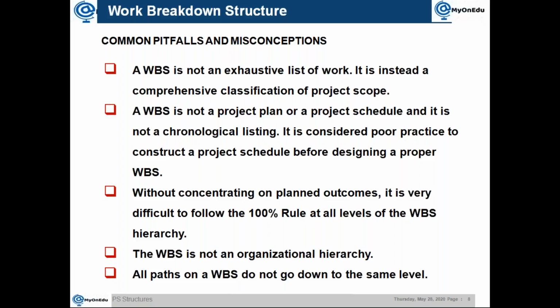So always and always, even if you go for PMI standards or almost all the implementation methodologies, they say give the ownership to the executing party. Whoever is going to execute the project has to take the ownership of the project, or you can say the plan, or you can say the structure. So whenever you are considering the WBS structuring, consider it from an implementation perspective, or you can say an execution perspective. So that's what I said.